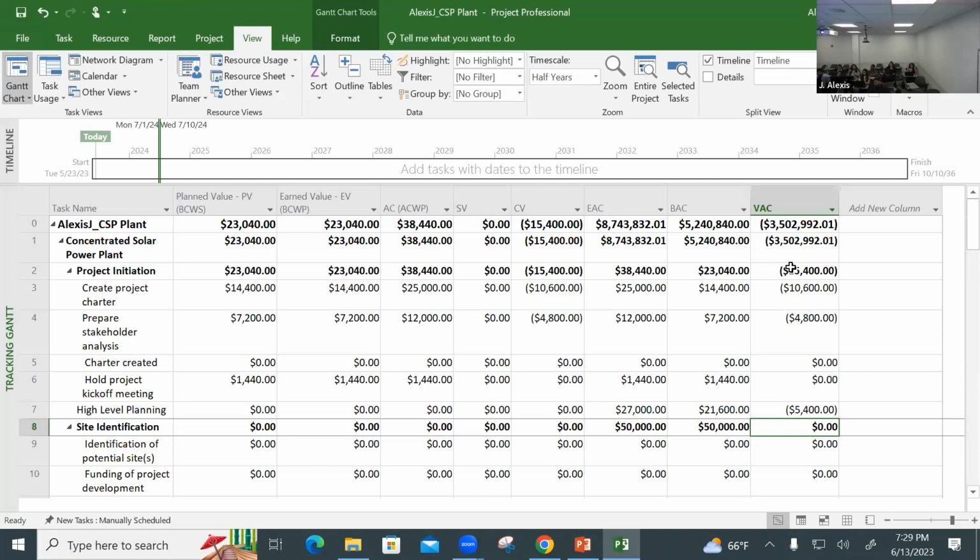The indicators are not very reliable until about a quarter of the time of the project has elapsed from the execution phase. You need enough data for the indicators to be valid, right? If you had completed some executing activities, those would be valid indicators. But right now, let's say that we don't pay much attention to this yet.